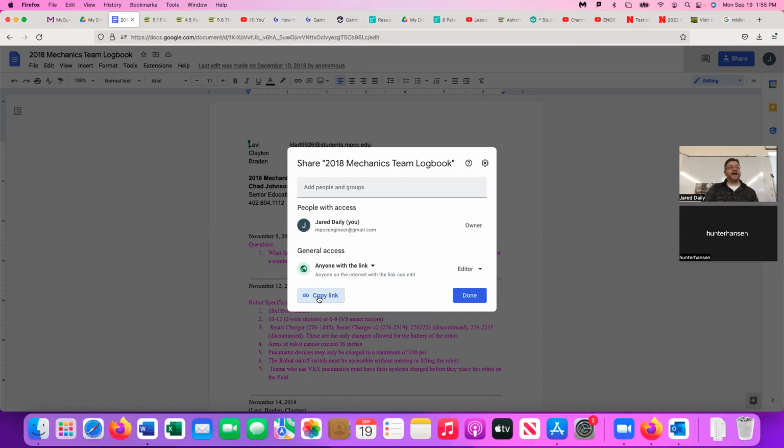And you don't want to go back and fix this document. Google Docs tracks that, so does Microsoft 360. It'll track when you enter things in and when you change the document. If you miss something, if you forget to put something in, just put it at the end of the document. You don't want to try to doctor it up and insert things, because if people have read through your document, they'll usually just go to the end of the document and they won't go back and look to see if you've changed it. So people will miss things if you do that. Don't worry if you forget to do something and you do it later. Just do it later and get it done.